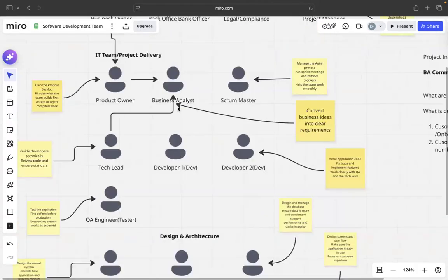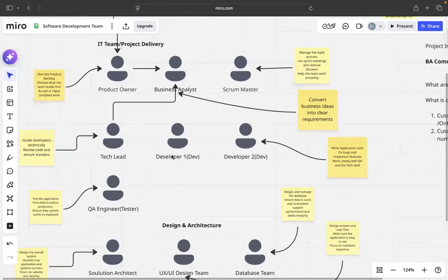Let's say I divided the user stories for the first release, for the April build. We have two sprints in 1 month, so 2 weeks is one sprint, 10 business days. The Scrum Master knows how many people are working, that one QA is working, and how many user stories there are. We plan it and pull them into sprints.